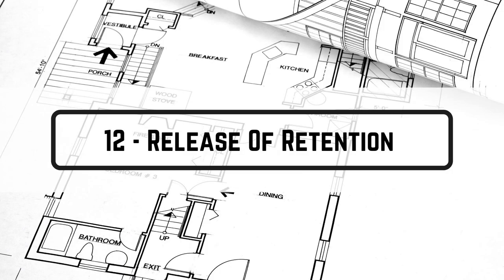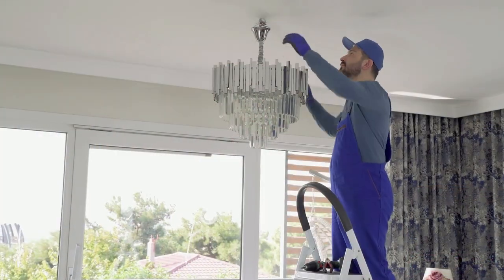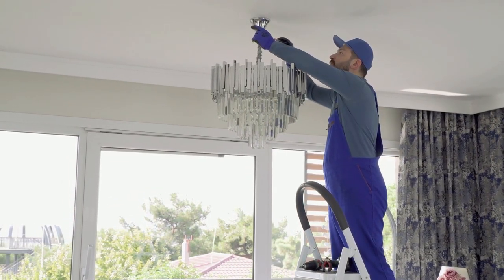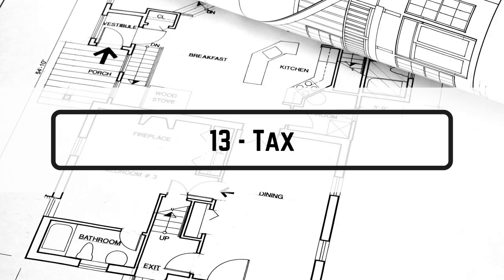Term number eleven is retention. Retention is an amount deducted from monthly payments to guarantee the executed works, and it is usually 10 percent of the total work done. This leads to term number twelve, which is release of retention. The retained amount is usually released partially: half upon completion of works, and the second half after 12 months — the defects liability period — during which the contractor is responsible to repair any defects in the works.